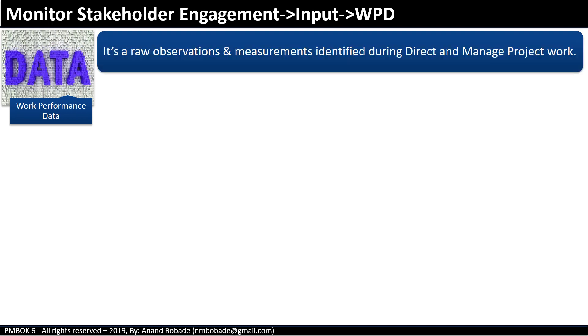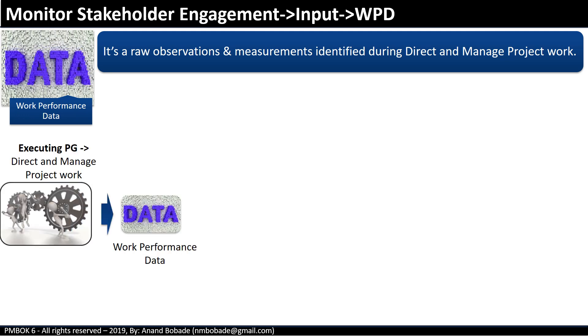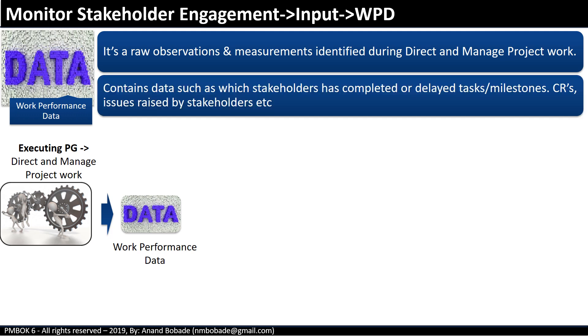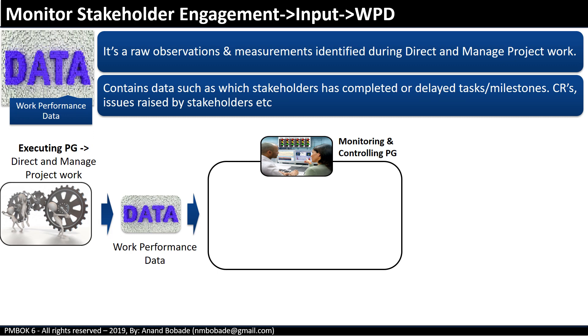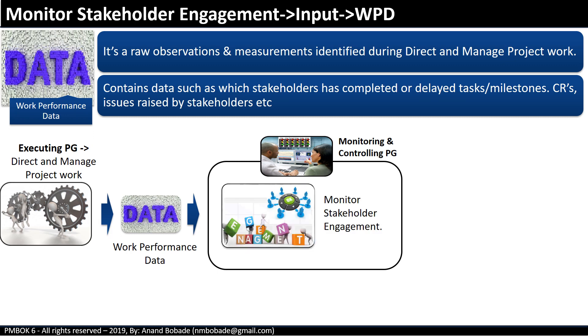Work performance data consists of raw observations and measurements identified during direct and managed project work. It contains data such as which stakeholders have completed or delayed tasks, milestones, change requests, and issues raised by various stakeholders. With this work performance data, the project manager monitors and analyzes the current level of stakeholder engagement.